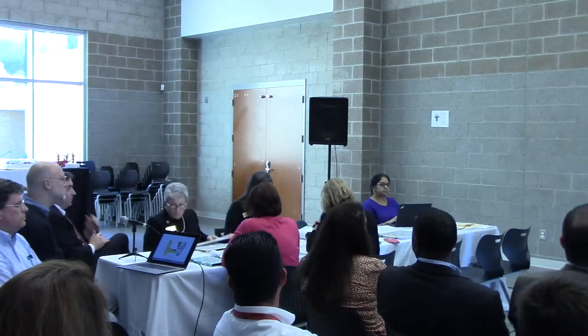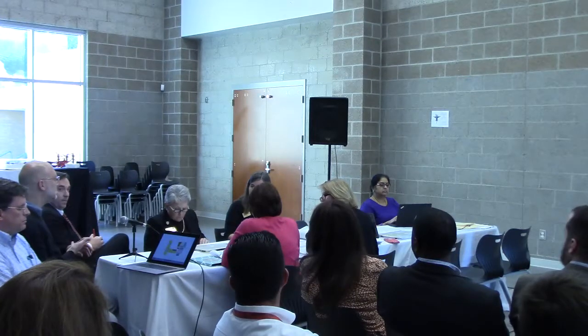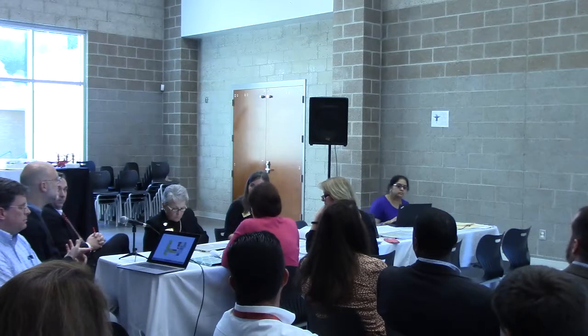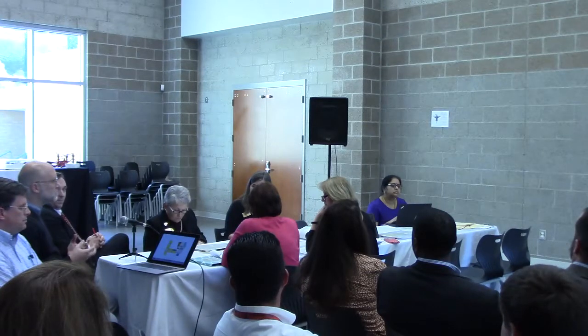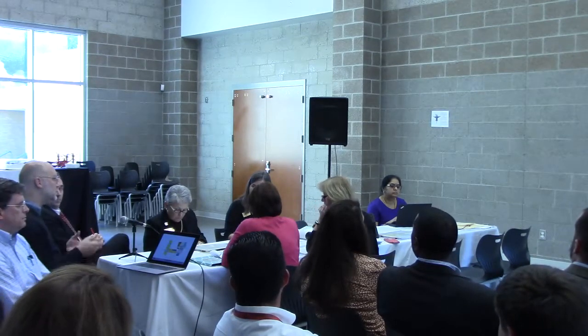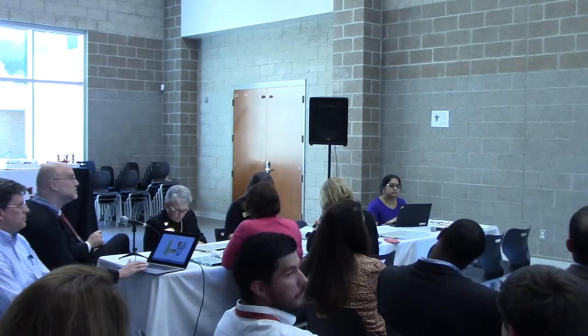I should note, too, that we are beginning construction documents. There's basically three phases of the design: schematic design, design development, and construction documents. We've completed both schematic design and design development. So now what we're doing is putting together a set of drawings, based on what we've developed to this point, that will be bid by the contractors.